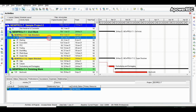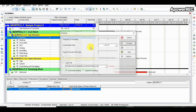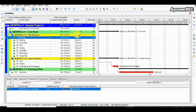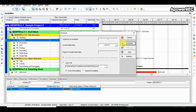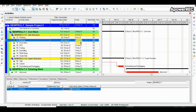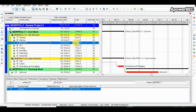For cleaning, we cannot start on the same day the site is handed over — we need mobilization time, so we keep a 2-day lag and start cleaning by 4th January. For marking we have kept a 2-day lag but it can be done in 1 day. All these changes can be made by the scheduler with the team after discussing practical aspects to make the schedule more realistic.